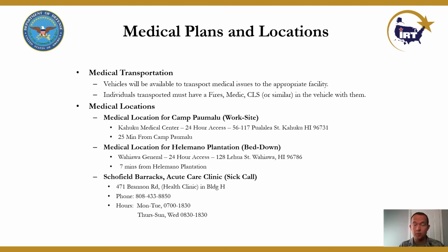A lot of this work we do, IRT work anyway, is in remote areas where the response time could be from 15 to 30 to 45 minutes to an hour. And that's just too long. If somebody gets a critical injury, we want to have EMTs there on site. So if you can bring someone and their bag, whether you go to the fire folks or someone happens to be an EMT on their day job, we want to have somebody there to look after our folks in case we're in a remote area.